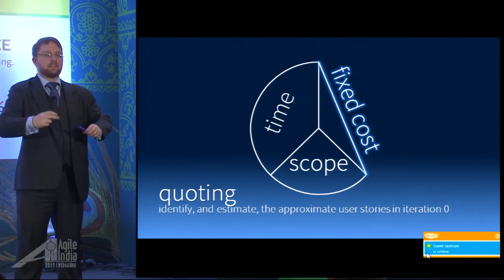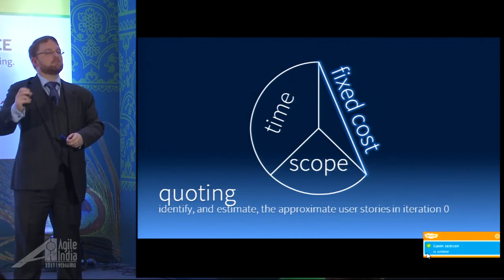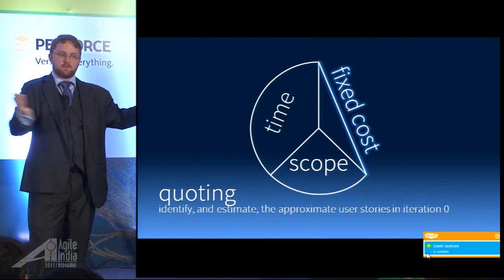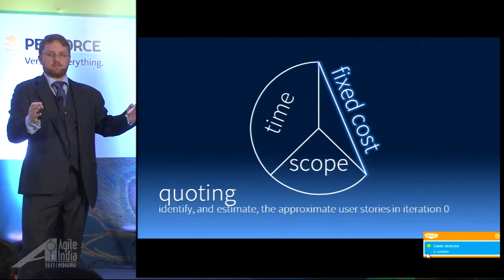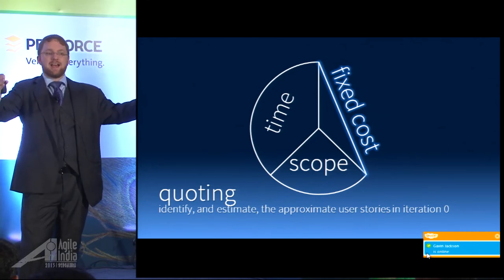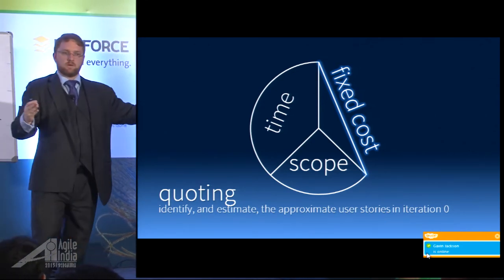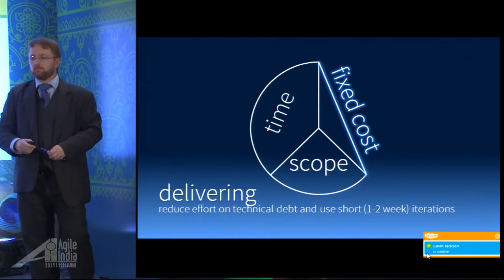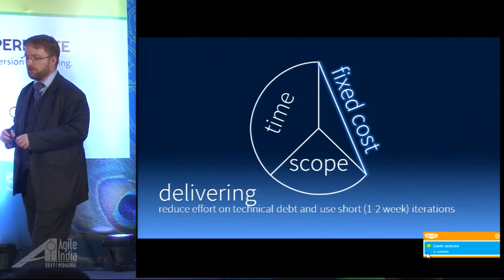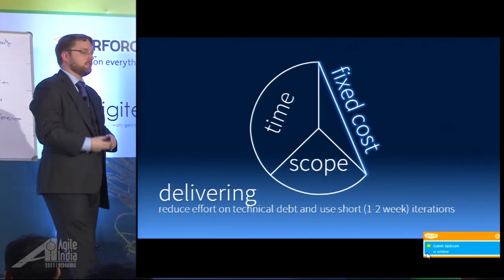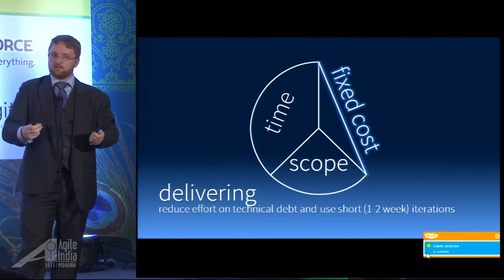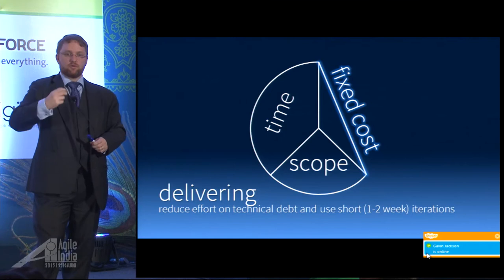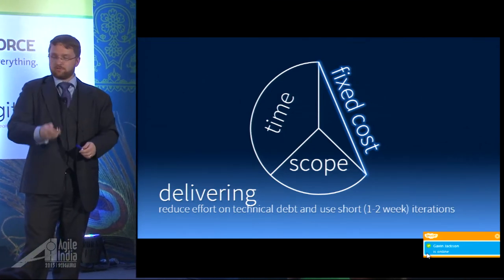When we're talking about a project with fixed price but flexible time and scope, we want to make sure we place emphasis in iteration zero to plan, because we need an assessment of minimum viable product and minimum marketable feature. We can't just say X as a quote without it being greater than the minimum viable feature. We're not doing a formal quote of all features and story points — just what is more than minimum. And if you are using a fixed price, you should be using shorter iteration cycles; longer cycles have a tendency for greater overruns and poorer estimation.